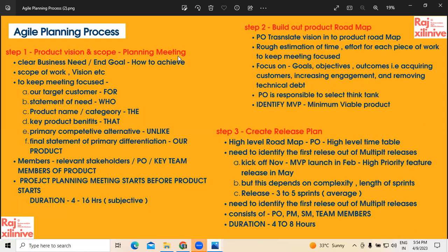If it was not completed, assume that there was one balance, that you have moved into the product backlog. What you do now, again, you need to do the refinement, because whatever priority a product owner expects in the first sprint may not be the priority in the second sprint, because the priority might change due to market conditions, all that.